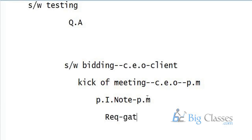After the Project Initiation Note, the next stage is requirement gathering. Requirements are the client's expectations — for example, if a client establishes a bank and needs a bank website, they might need certain logos, colors, and features. Those are the client's requirements.